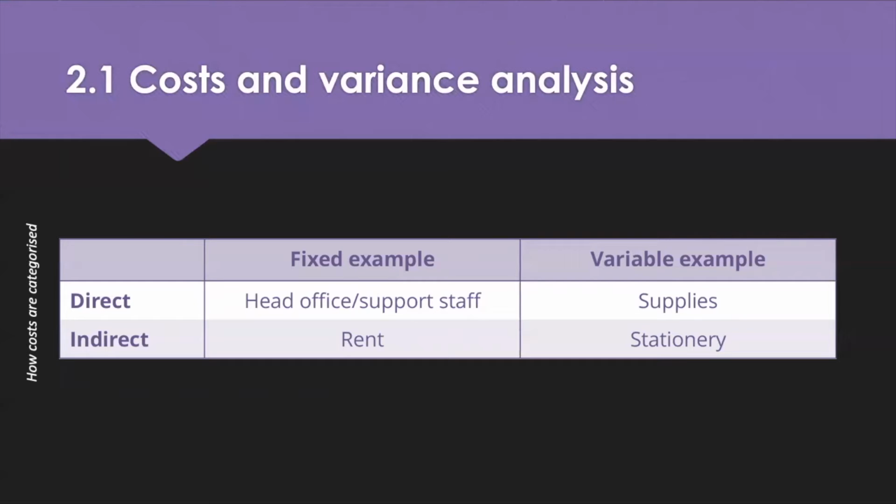Variance analysis is commonly applied to variables of scope, cost and schedule. But in the area of budgetary control, spending variance is the primary measure. So for example, spending on a particular material may have gone over budget, either because of a change of price or a change of quantities. The analysis will identify what type of variance has taken place. A variance can reveal what's known as a favourable variance, which is an actual result that's better than the expected result, or an unfavourable variance, where the actual result is much worse than you expected.